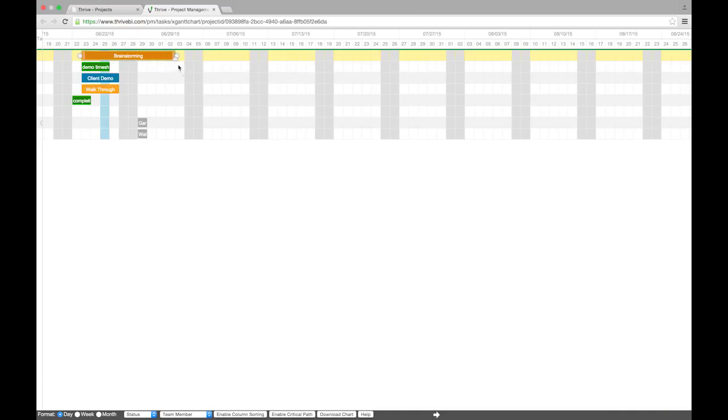And then let's say, because this is a parent task of this, we can actually make a dependency just by clicking this and dragging it right over to the task that, hey, this is not going to get done until, and if you notice, it'll hit here. So the cool thing is if we move this in any way back or forth, it's going to affect the other task. So if one's dependent on another one, if I move this back, then this knows once this is completed, this will get moved as well. So if it gets completed sooner, then it triggers that next task to be completed.